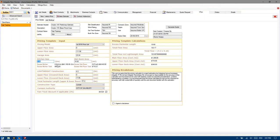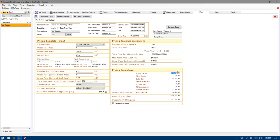As you can see, these values here are adjusting to reflect any additional charges applied due to greater kitchen length or wet area size permitted per metre squared of living space. In this instance, 0.54 to the new metres or $590.20 and 5.07 metres squared or $710.21 have both been applied to the base price just here.